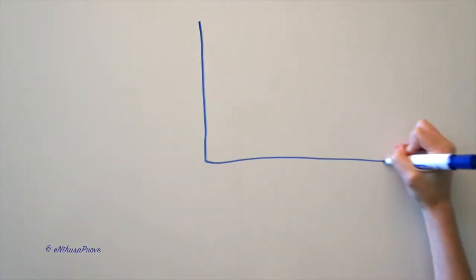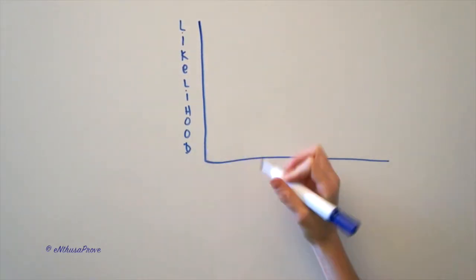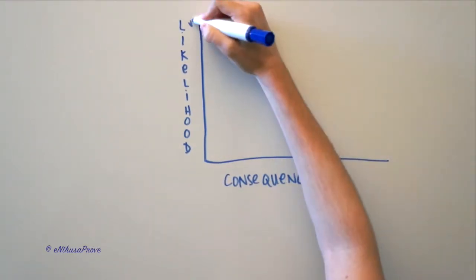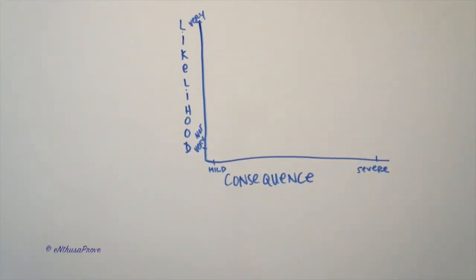As a refresher, we have our risk matrix with the two components to risk: likelihood, the chances that this something will happen, and consequence, how bad will it hurt if this something happened. We've kept the axis labels very generic, but your team will need specific operational definitions so each team member can understand and agree with the assessment of each risk and its corresponding location on the risk matrix. These definitions would put in context what high, medium, and low consequence and likelihood actually mean to this team.